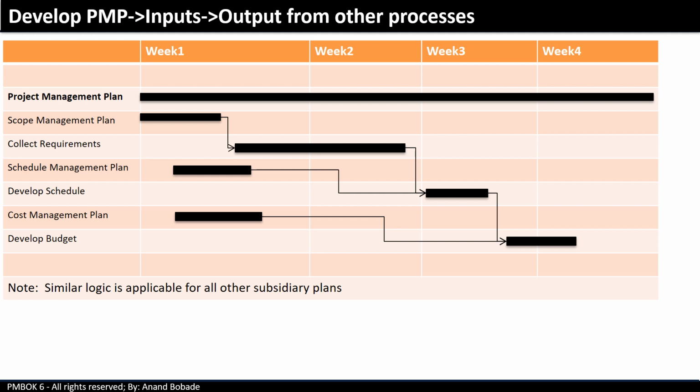Let's take a further example to understand how to prepare the project management plan and at what stages all these subsidiary plans will act as an input. Imagine you are working on a project, you have been given a project charter and you have to start planning. So the next step is to create the project management plan. But the problem is, where do we start? So I prepare a schedule to complete all planning activities in 4 weeks. I will start working on the project management plan by documenting project approach, project phases, phase-wise deliverables, etc.